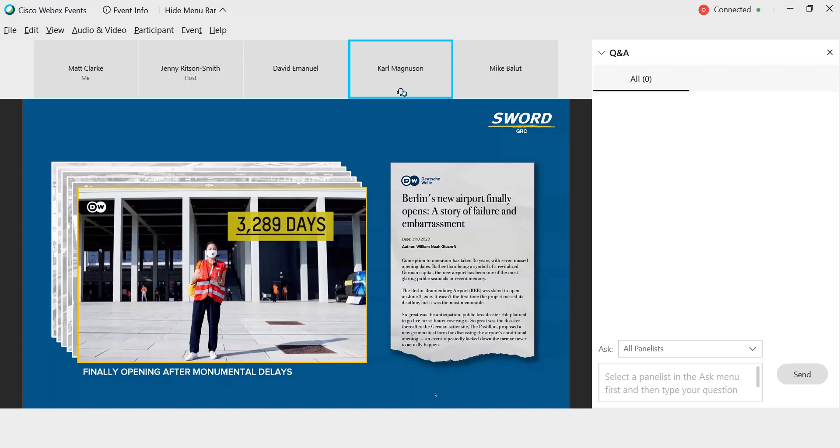After missing seven target opening dates, the airport did finally open in October 8, 2020, nine years late and 1.6 billion euros over budget. As one news article says, the new airport was a story of failure and embarrassment.